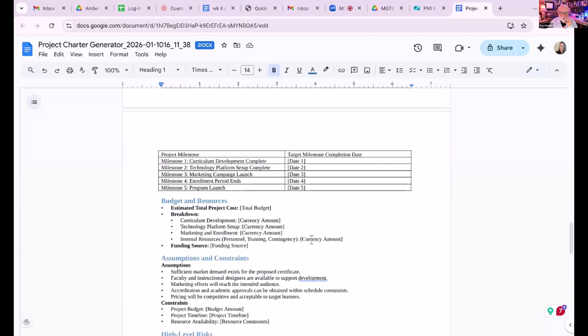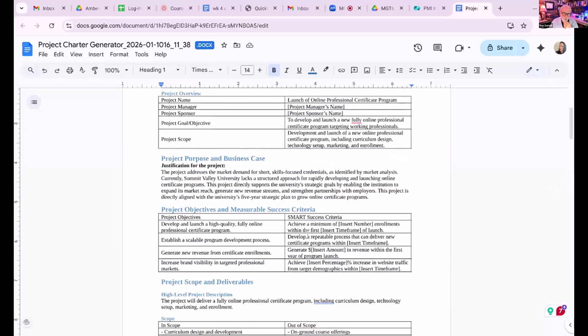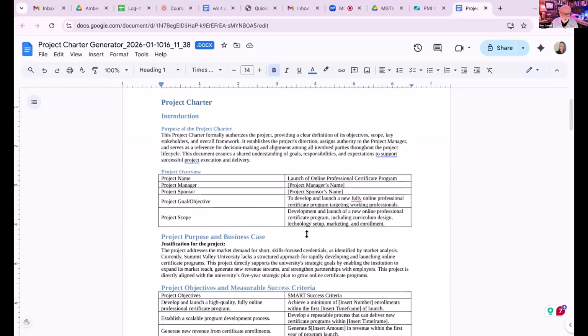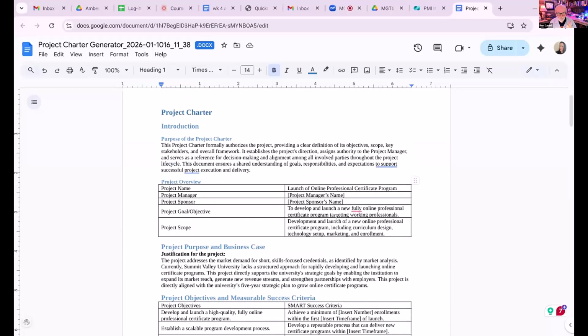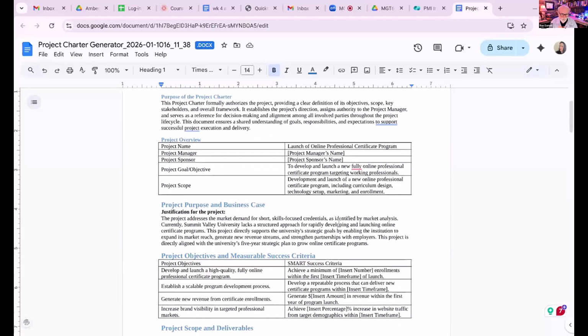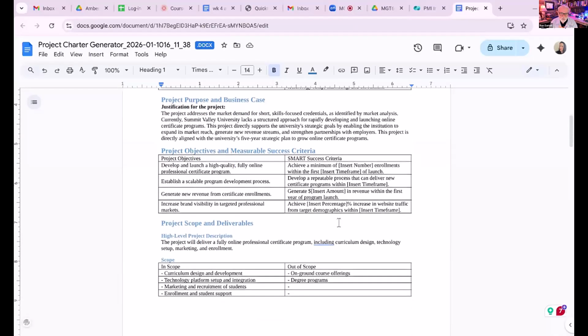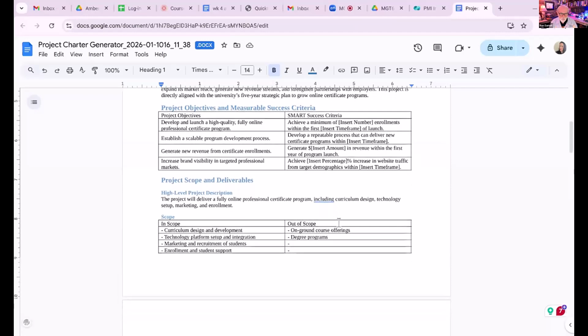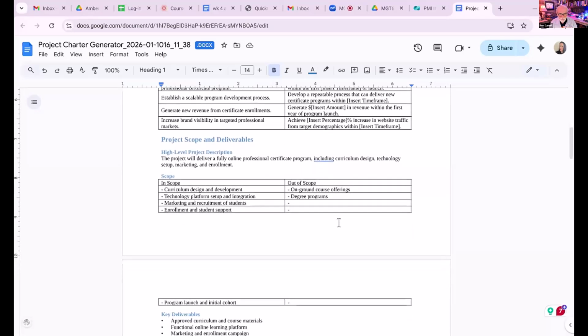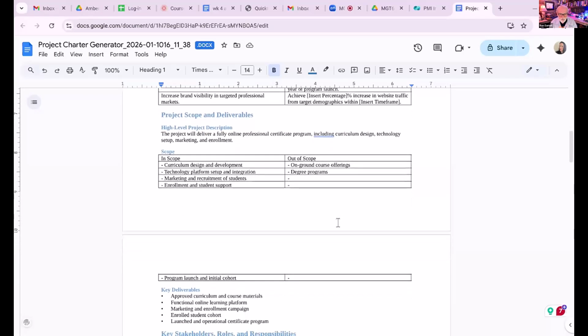So you can see what Infinity's doing here, and this is pretty common, especially for small to medium-sized projects, where the charter, the stakeholder register, the assumptions log, all of that stuff is in one document, right? And so that's one way to see this, and you present all the initiating artifacts in there. And so when you get sign off, you've kind of completed the initiation process.